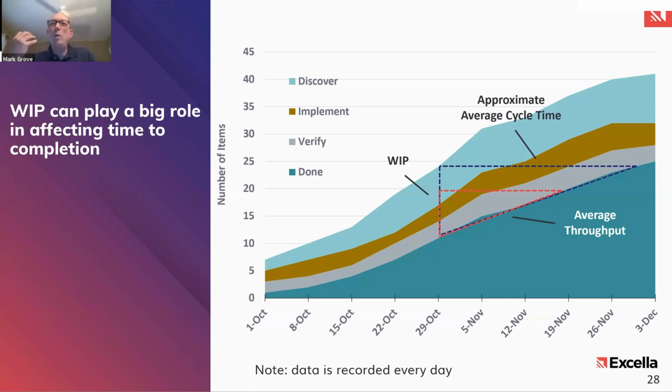So, when we're talking about bringing more items into our flow because one of these things is bound to be done, we're actually making things worse for ourselves, and this has been proven. I mean, it is a law. It's been proven that, assumptions given, the more items you have, on average, the longer things take. So it's just something to think about when you are working with the team. Really focus on those items that you currently have in play and get them to done before you reach back to the backlog and say, well, let's just bring something else in.